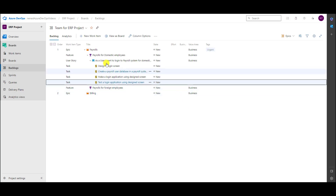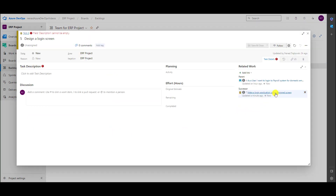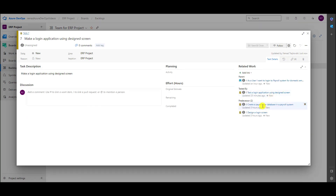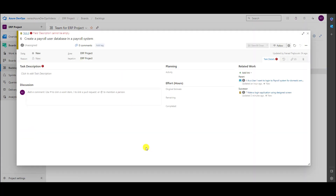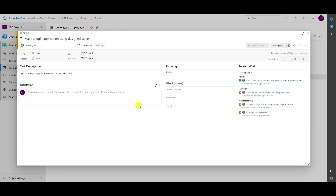Now 'Design a Login Screen' has a successor — 'Make a Login Application Using Design Screen' — because when I created a predecessor for that task, the other task automatically gets a successor. Similarly, 'Create Payroll User Database' also has a successor. Going back to 'Make a Login Application,' it has two predecessors, and there is also a task for which this task will be tested by — so when we finish this, that other task should test this task.